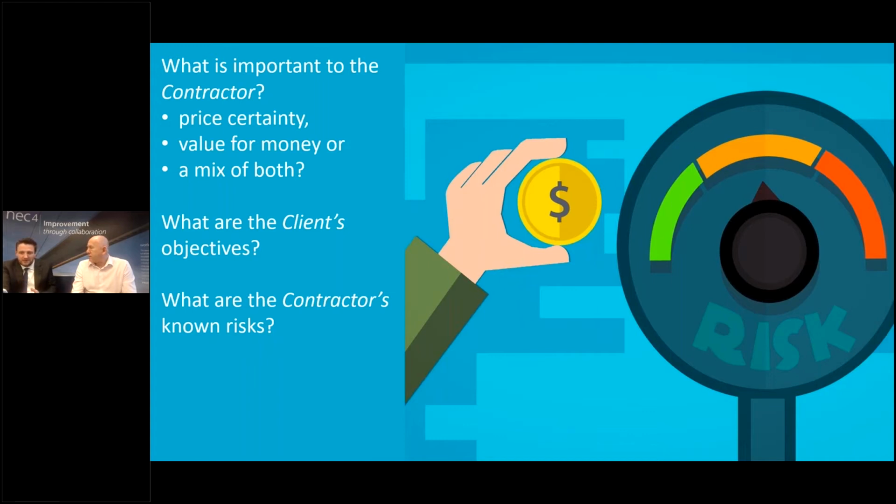I mean, they are basically the things that are in the contractor's liabilities and some of the compensation, delay damages or things like that. But again, just in the same way that we would be harvesting early warnings through contract data parts 1 and 2, we should be doing the same with our subcontractors and suppliers, understanding what those look like, and then having a discussion on who's most appropriate to hold those, and maybe some early mitigation.